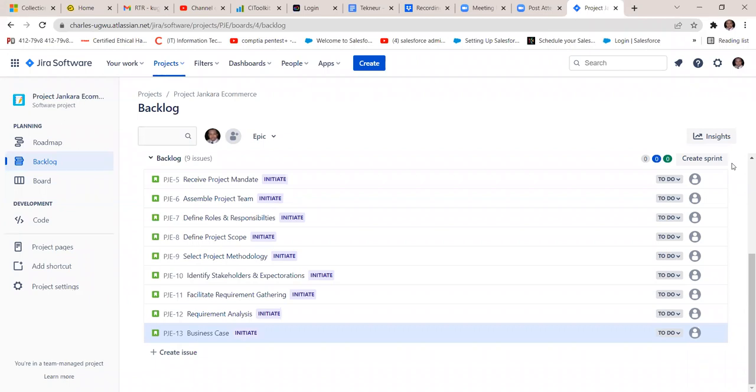So that's how we are going to start arranging our work, so that the developers will know which one is harder, and the amount of time to apportion to every user story. If it's work that is harder, they might just take one task per day and concentrate on it because it's very hard. But if it's very simple work, they can take like 4 or 5 tasks and work on them in a day. That is how to manage it.